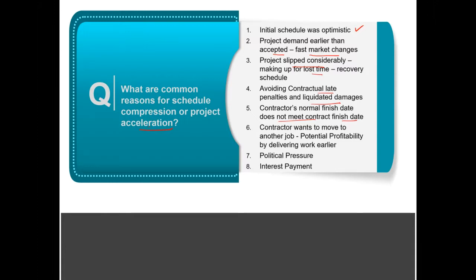So this may mean that you have to explore opportunities for compression or acceleration. Or contractors want to move to another job. They think there will be more potential profitability by delivering work earlier, so they may decide to do double shift work on this job so that they could release their crews and move on to the other job. Or sometimes there are political pressures.